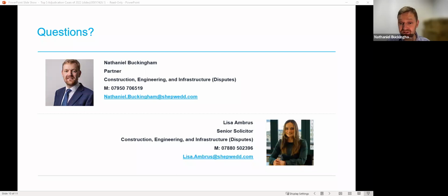And I suppose there may well be adjudicators on this call. If you are an adjudicator and you are worried that you might be straying beyond the submissions, then it is often useful to issue a list of issues for final comments, to make sure that you are giving everybody an opportunity to comment on the thinking and the direction of your decision. That can help to cut out any challenges.